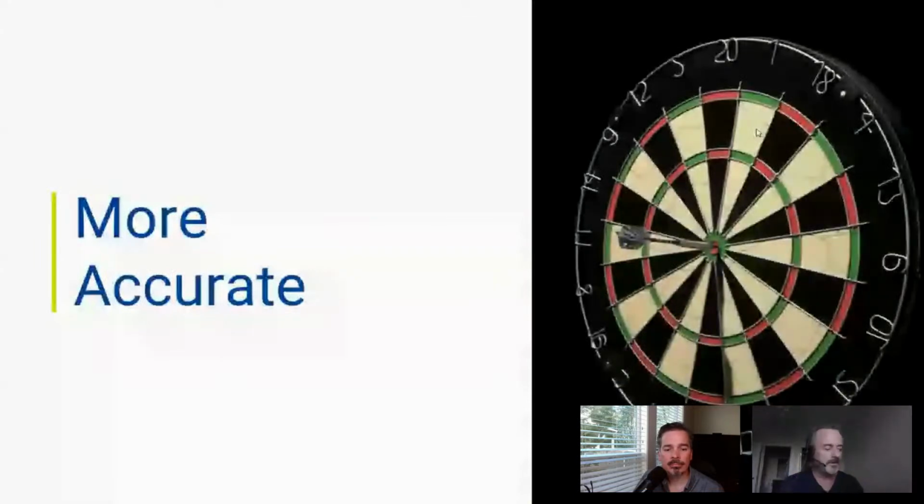So accuracy is a big thing with takeoff. And the thing I always worry about, and I preach this all the time, is the biggest mistake you can make in an estimate is leaving something out. Now, it could be something major like a feeder. It could just be a couple of receptacles. But anything that you miss is going to make your estimate less accurate.